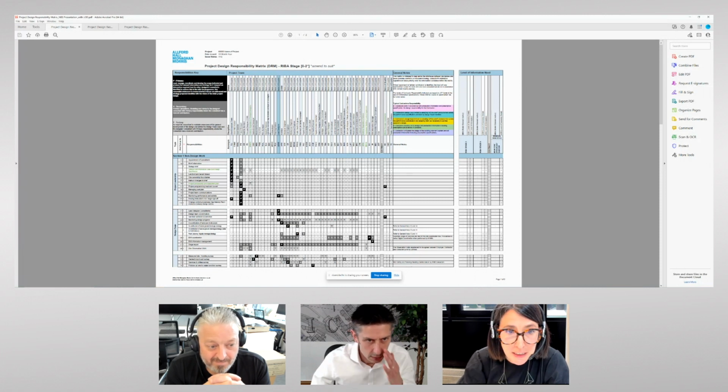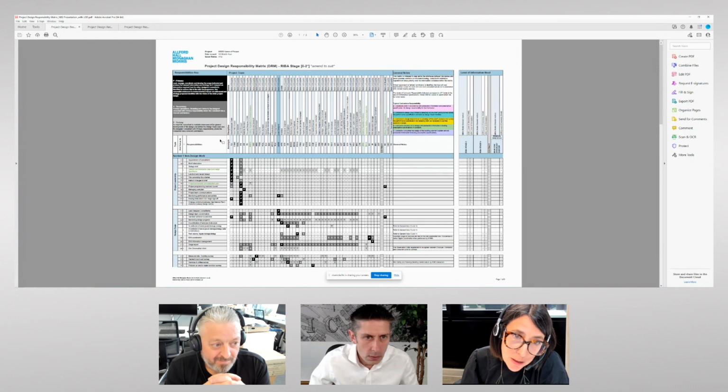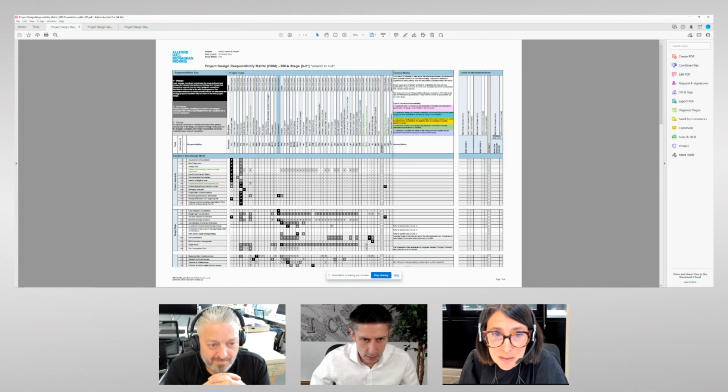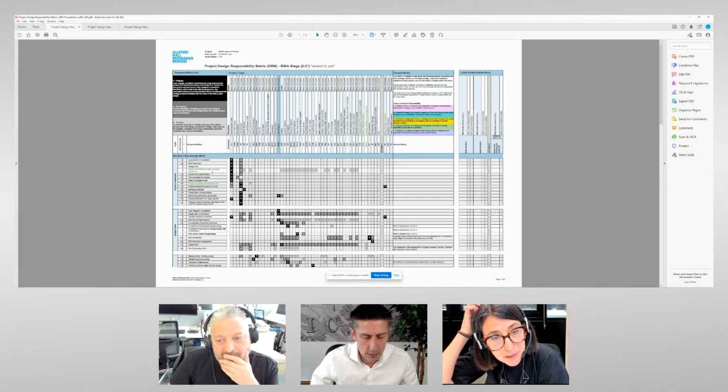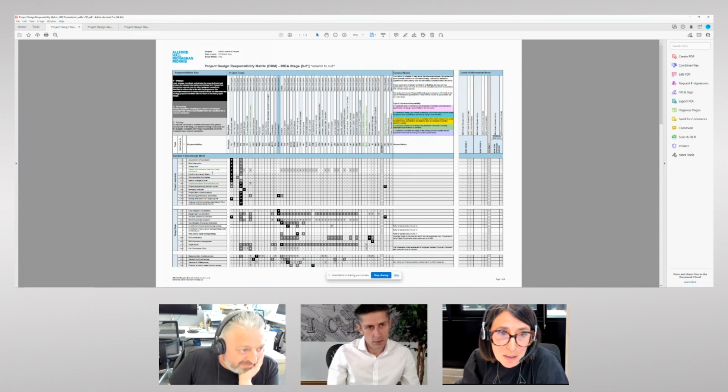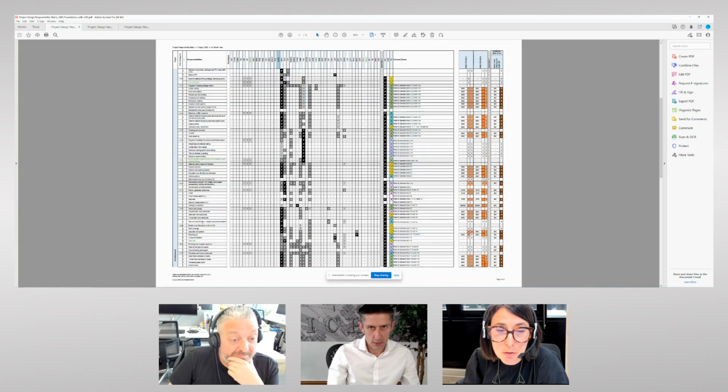So taking this, our template is defined by project team at the top, which lists all the typical members of the design team prior to contract, and then after contract we have the principal contractor and their trade specialist subcontractors. We also split the DRM into administrative management work, so non-design work, talking about project leadership, design team responsibilities, and we also then split it into design work, so architectural elements, structural elements, MEP, sustainability.